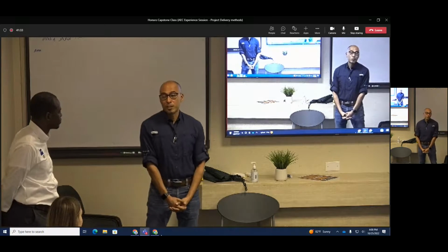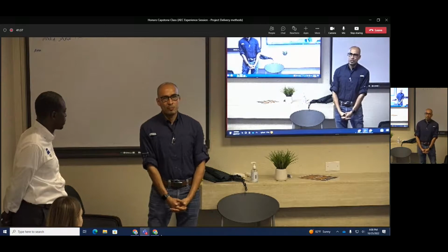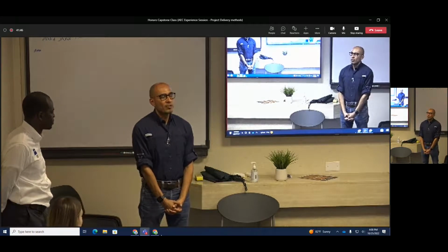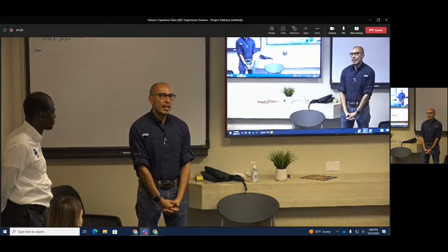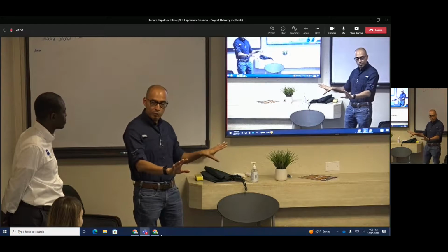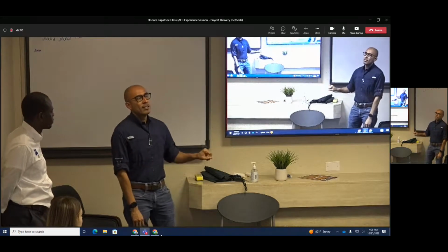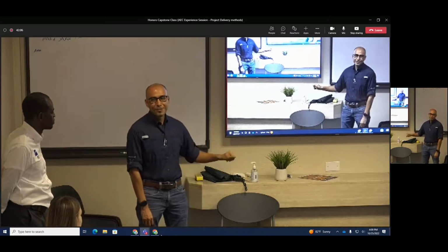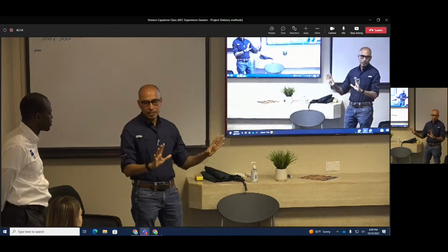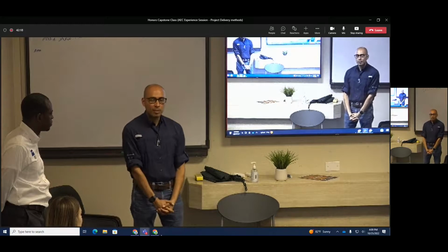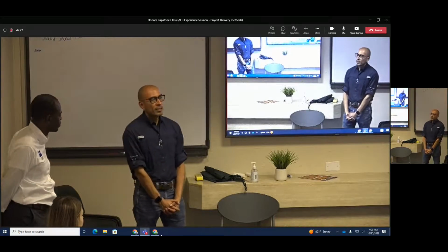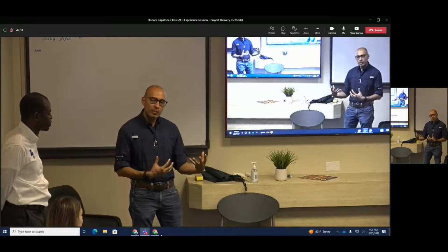Morphosis, we aren't familiar with them. This is the first time we've worked with them, right? So that relationship started to build, right? And then we started figuring out, okay, this is a bit more of a technical question. It isn't something that this individual necessarily wants to answer because this is an office area type question. And office area type questions get resolved by this architect, and she's quick. So we're going to go to her. But this question has the whole aesthetic of this area. So now we have to go to this architect, and he's going to take a little bit longer. So we have to come to him sooner to give him time to respond. And so those are the things we have to be adjusting for on those projects.